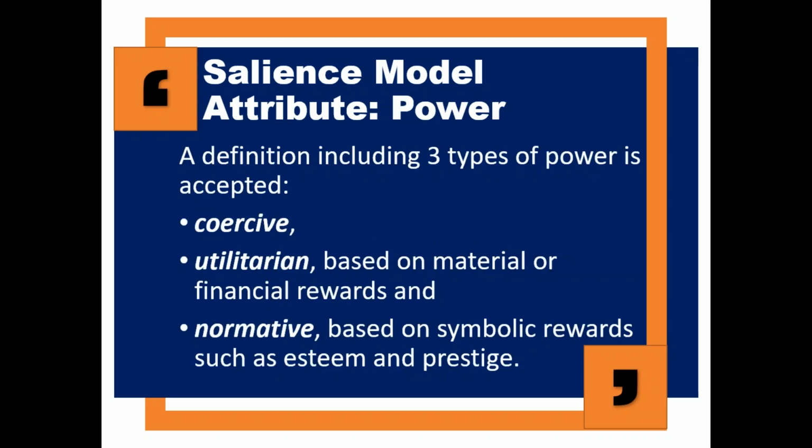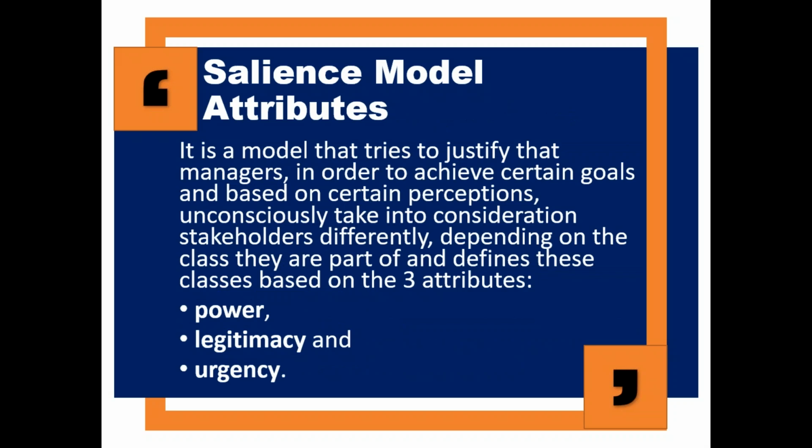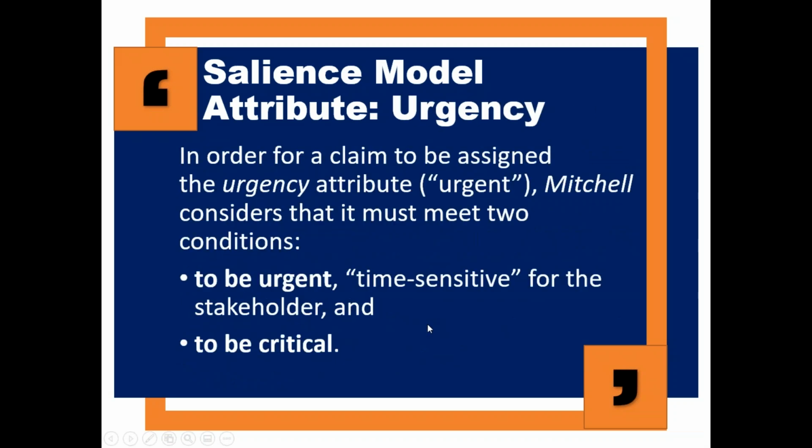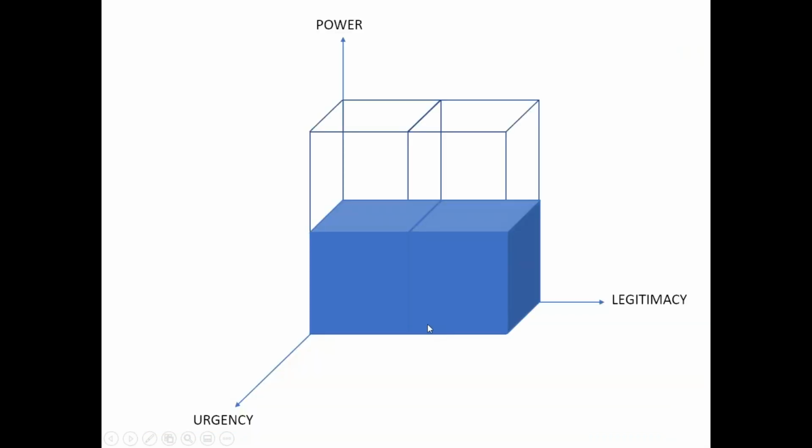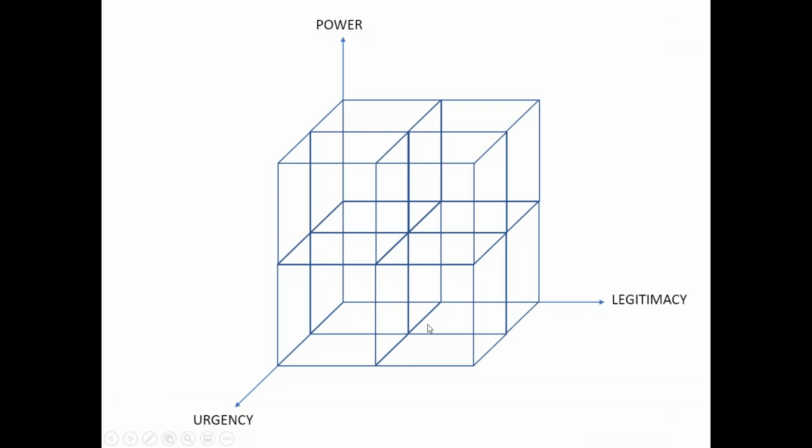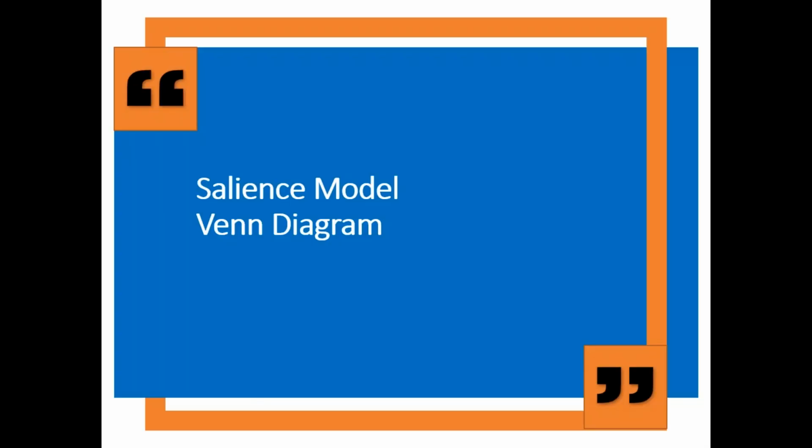You have the negative axis. I'm guessing the size of the dot, the size of the stakeholder, could be it. I remember that there's something called a bubble graph. This is called a bubble. So this is the salience model. We can show it as this. This is a 3-dimensional model. You can see that this is 3 dimensions, and I'll be plotting all these things on this, right?